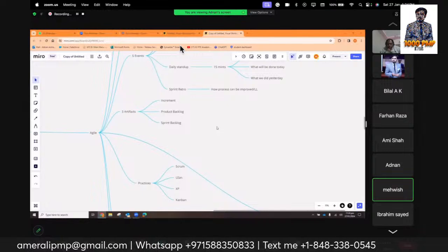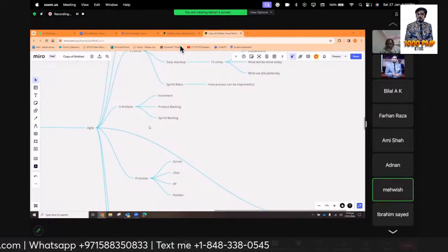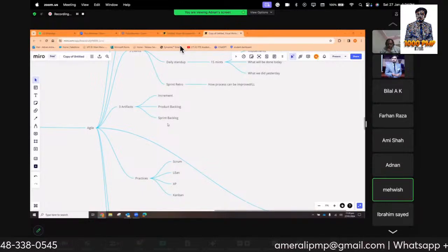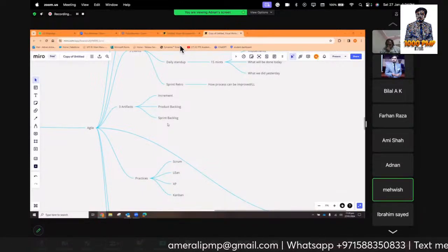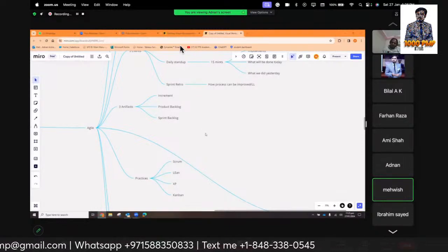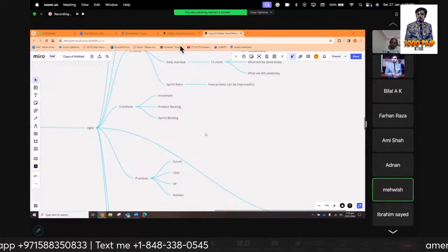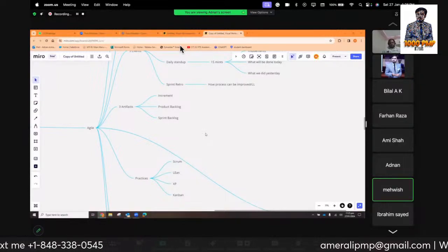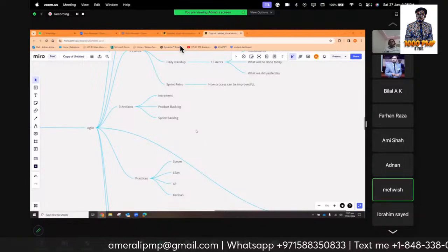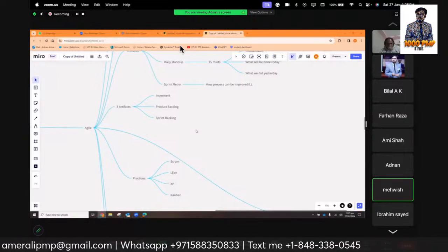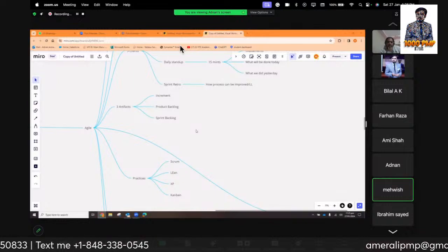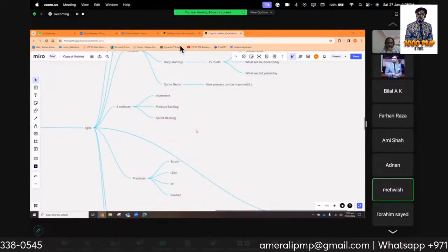Here in these 3 artifacts, we have a product backlog. In the product backlog, we have a set of user stories, which we write with acceptance criteria. It's the responsibility of the product owner to prioritize the product backlog, and then based on that we decide what will go to the sprint backlog, and from the sprint backlog we start the sprint. I forgot to mention we have one more stage, which is called sprint 0, where we do the architecture spike, like whether it is technically possible or not, or what is the risk to start the user story.